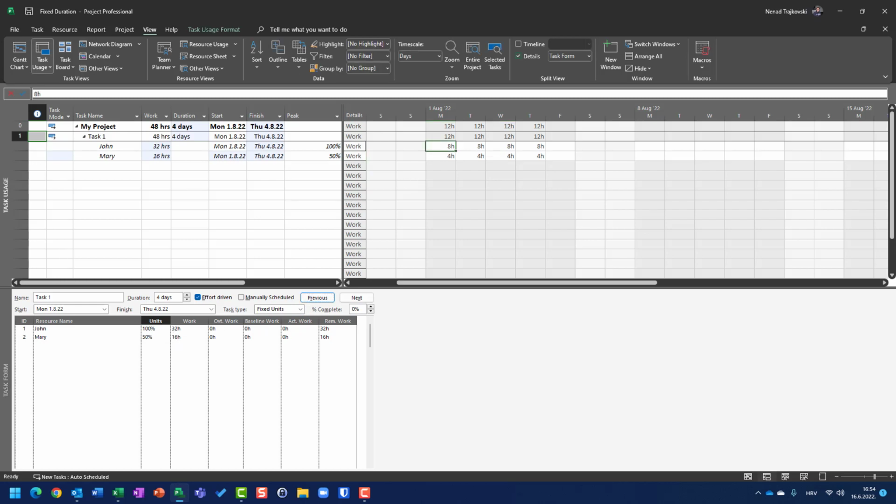Why? The first day, 12 hours both. It means John 8 hours, Mary 4 hours. It is 12 hours the first day, 12 hours the second day, 12 hours the third day, 12 hours the fourth day. In total, those 48 hours are going to be finished in 4 days with John and Mary, instead of 6 days if John works alone. And in this situation, the math works. And the math works in my previous example, but it is a little bit awkward. But you have to get used to that.